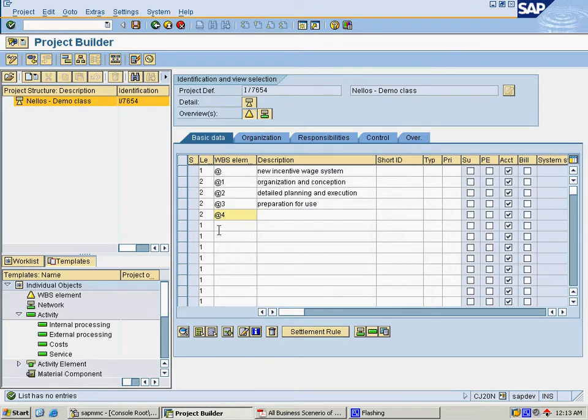Here we need to mention a small thing about the @ sign. It's an entry ID operator which was defined in the customizing section. We can use it to create the WBS elements faster and with flexibility. The @ automatically picks the project definition, and based on the project coding mask it derives the WBS element name.